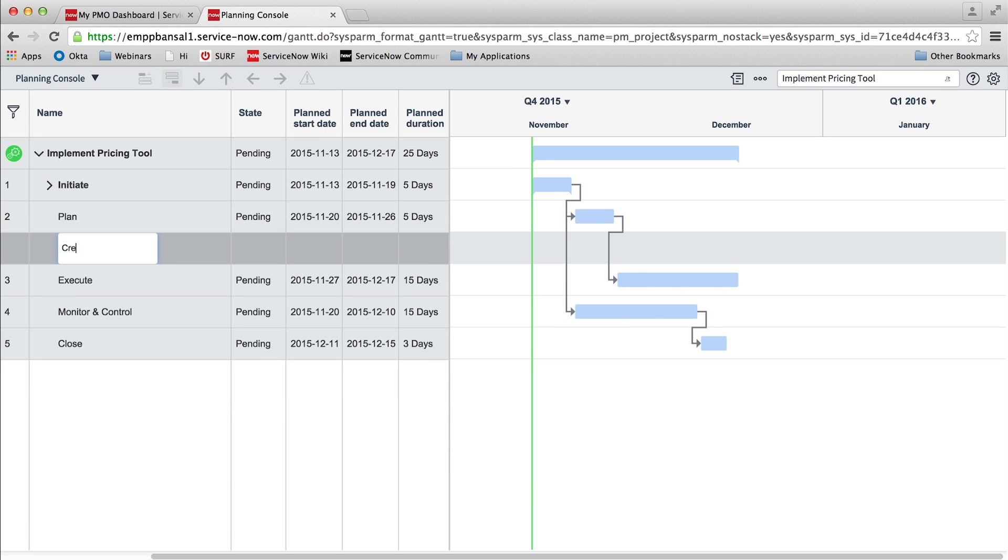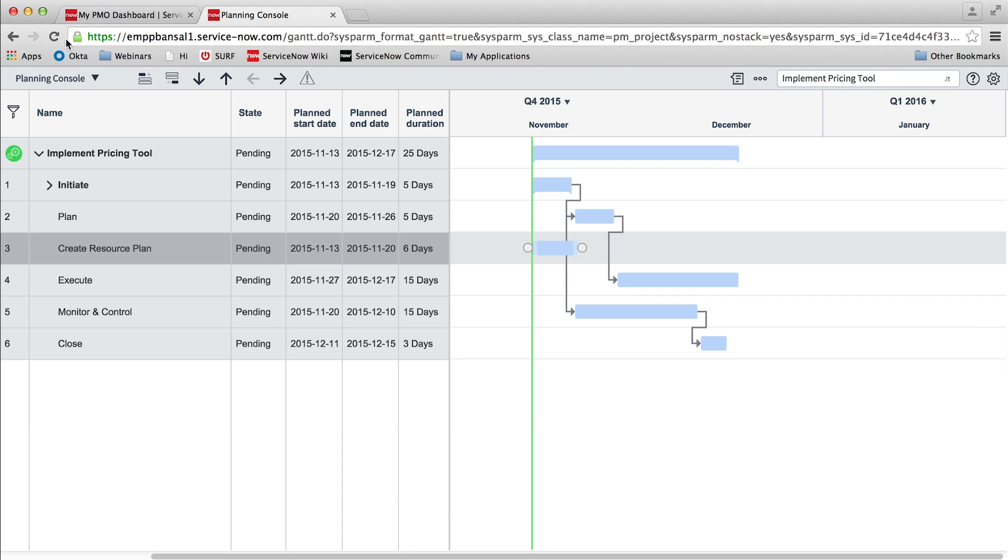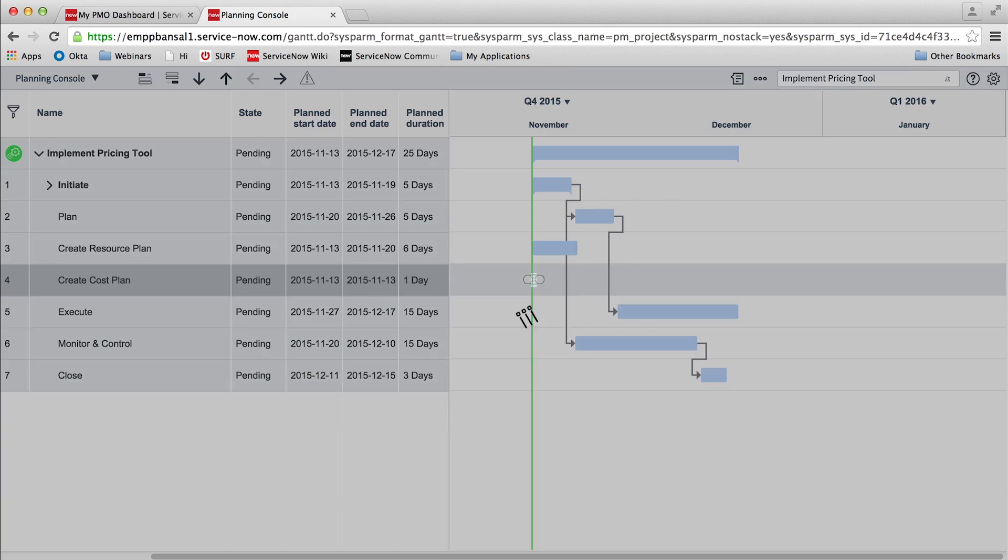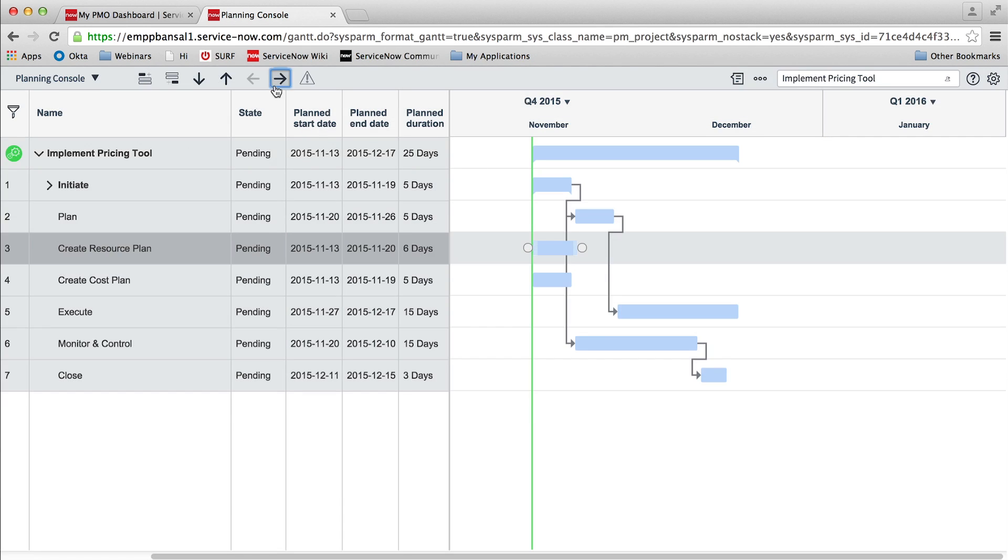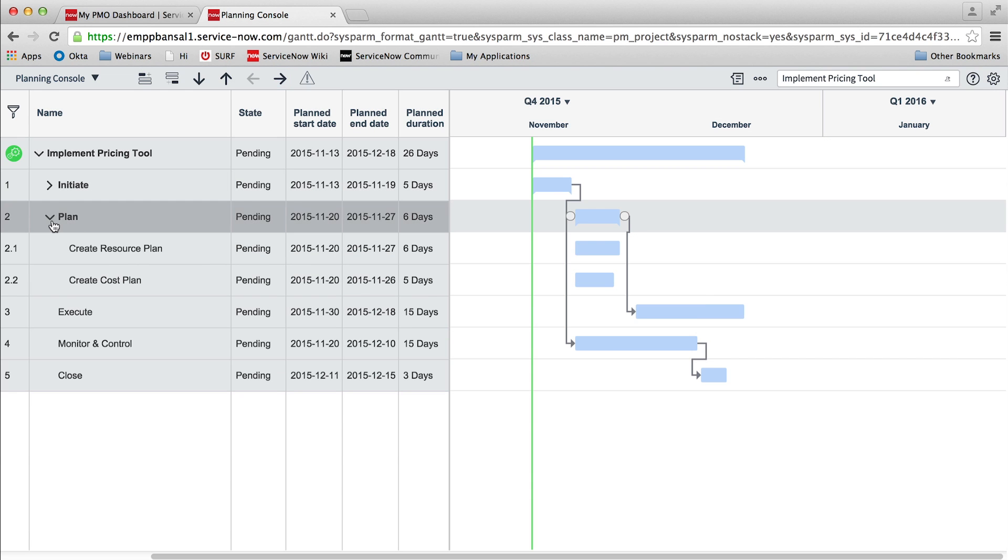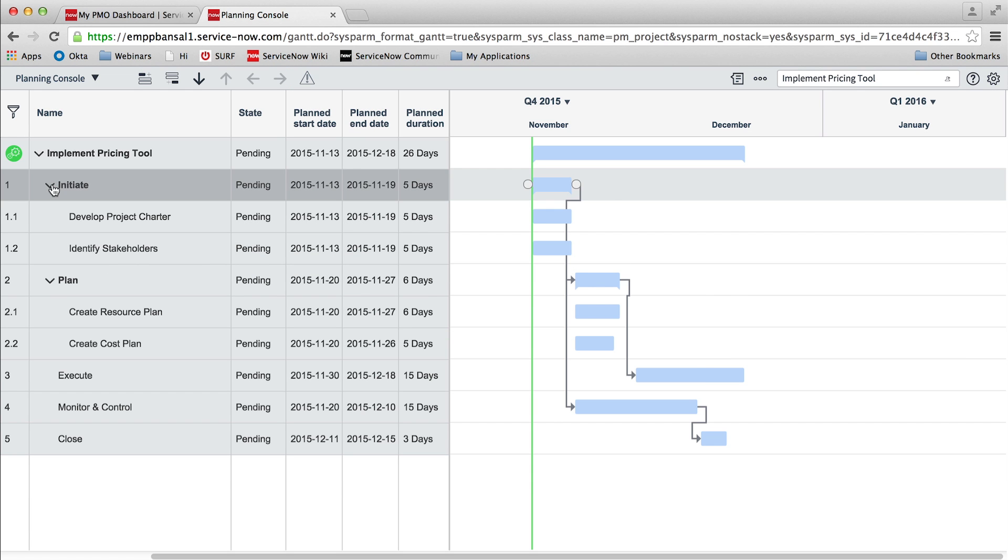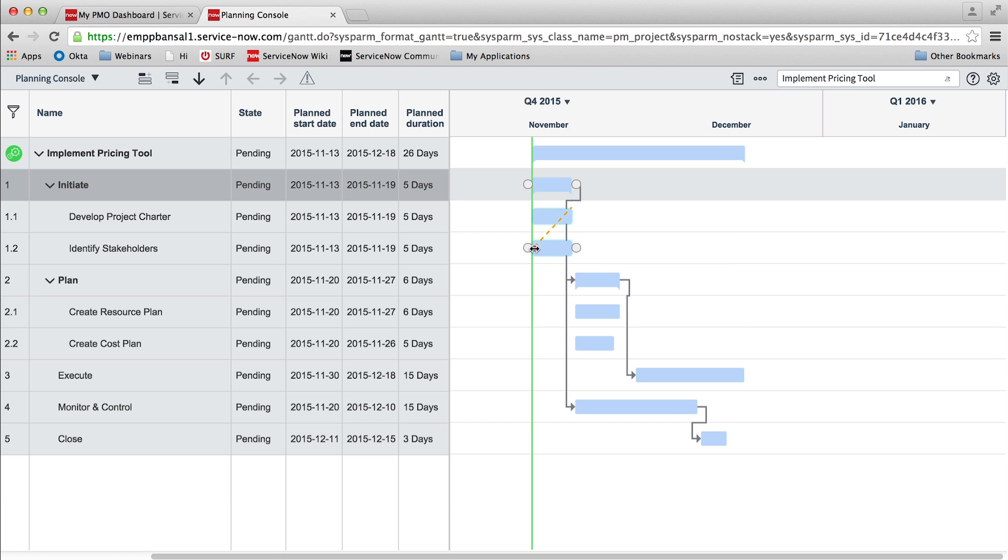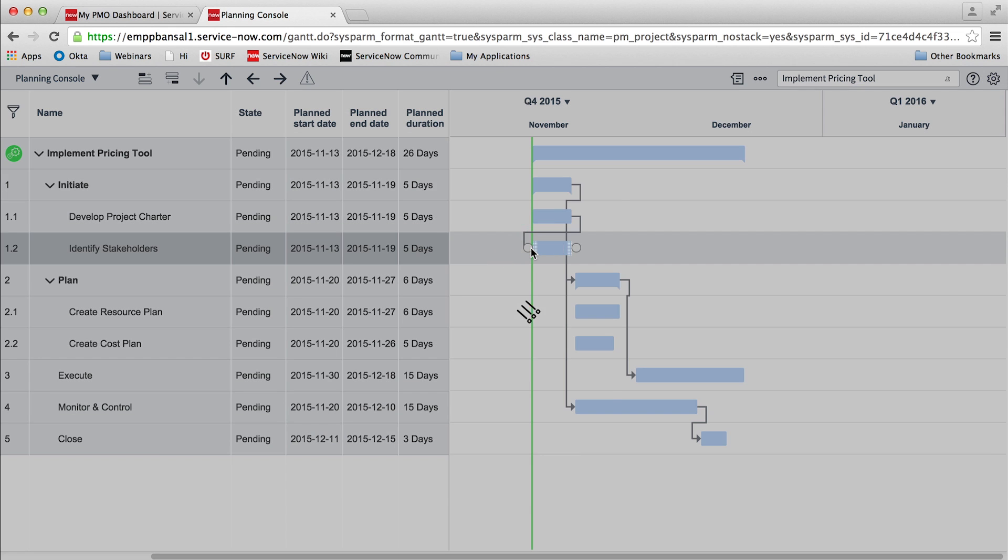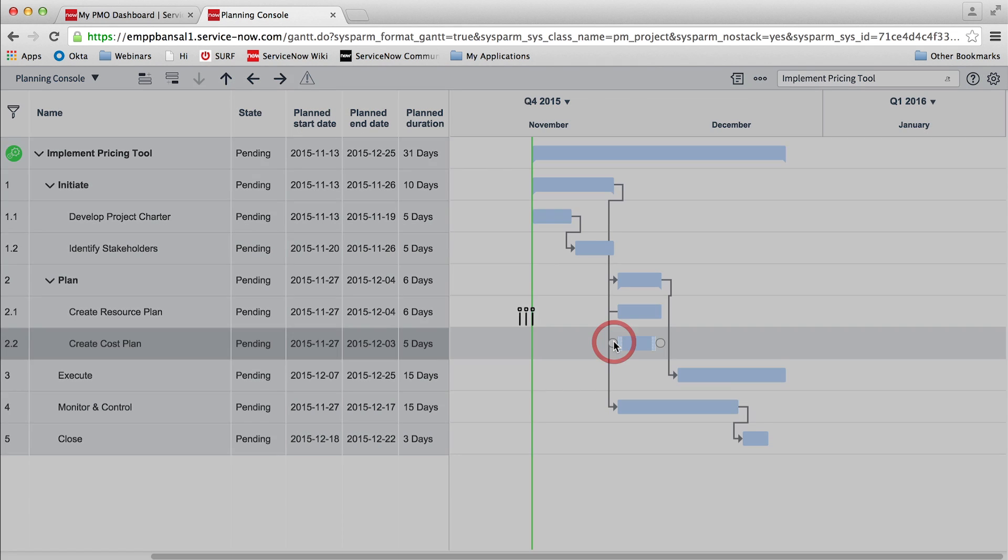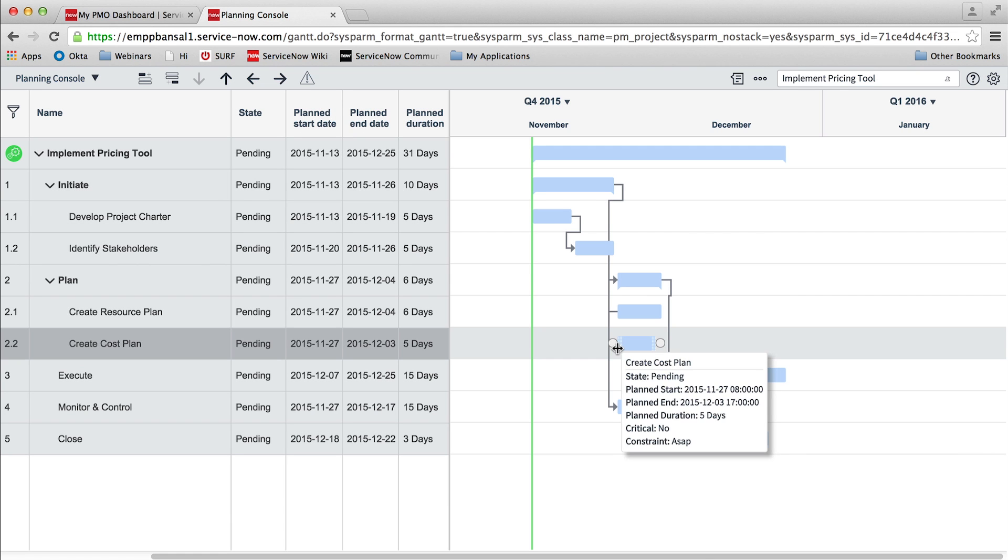The planning console also allows us to create any kind of dependencies among the project tasks with desired lead and lag times. We can select start to finish, finish to start, or start to start dependencies among tasks, to ensure the tasks are started and finished at the right time in conjunction with their predecessor and successor tasks.